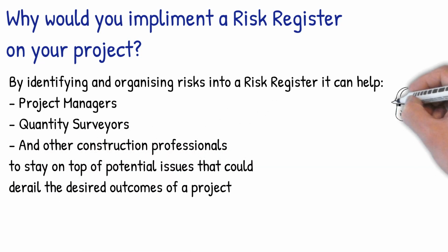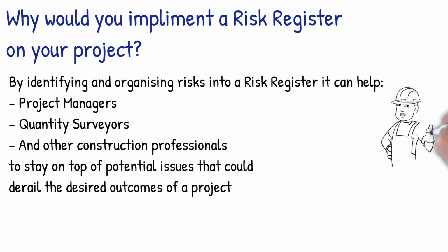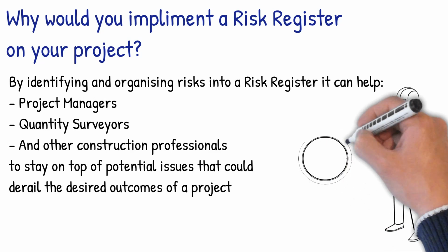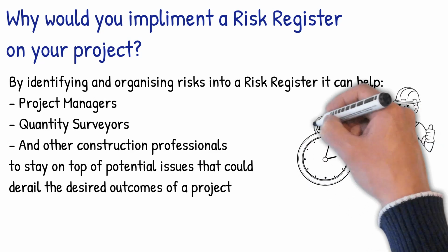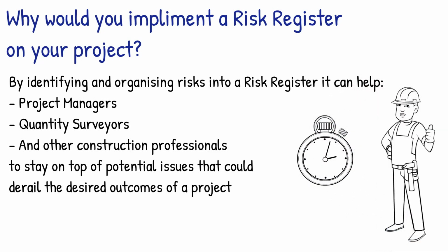With this being said, it is good practice to start a risk register before a particular project even begins. In all honesty, there's really no time too early to start thinking of potential risks to your project and logging them into a risk register. The register is then used during the construction phase as a live document throughout, with risks being identified, analysed, and reduced on a daily basis.